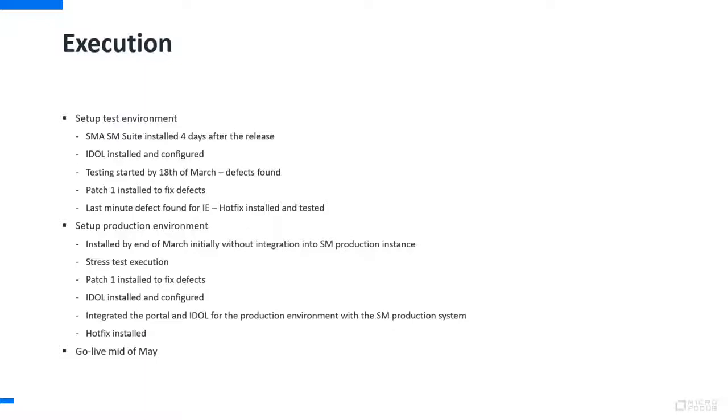And since this time it was a production system, we had to wait until change requests had been approved and scheduled, and an outage or maintenance window was required to put these changes in place, so that the front-end portal can connect to the Service Manager backend IDOL system, so that catalog items and knowledge documents, for example, can be searched and found from the portal itself.